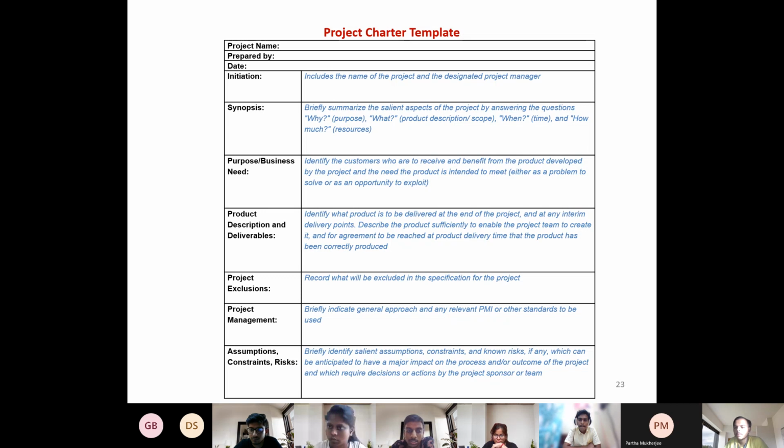I have one point from my side. Yeah, go ahead. We can put the point that we are only helping you in setting up the things, but if something goes wrong, we are not available for fixing those things. We won't cover the maintenance costs that are supposed to be paid, and we are not giving any guarantee for the coming days after this. We don't ensure to always come back and help you. If you want, you can call us and get help from us, but it is not our duty to always come and check whether it's going well.